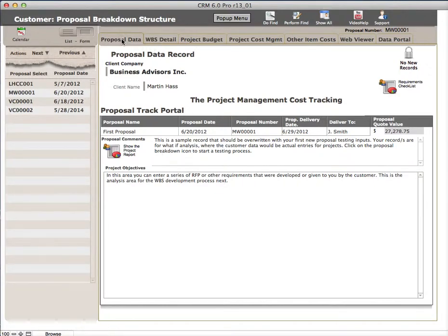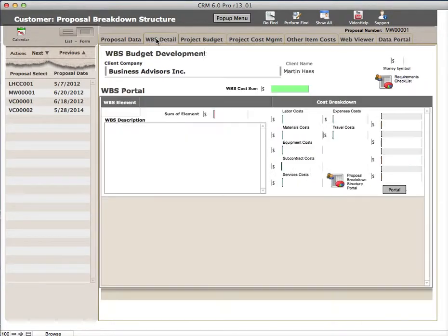Now, if you go up to the tabs above, this is the breakdown of all the information as you're going through, like the WBS, to do your quotes appropriately for each element of a proposal, and then the breakdown structure as far as each thing, like if you do a 1.0 element, a 1.1, 1.2, and then 2.0 and so forth. These could be costed individually, so that if you do not get a part of the contract and you get other parts, the client can offer you that particular portion of it based on the costing that you did as far as your estimate within the WBS breakdown.